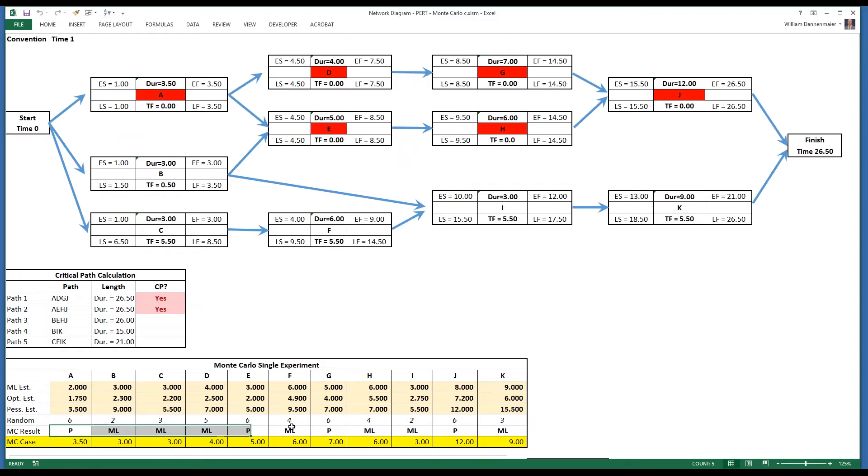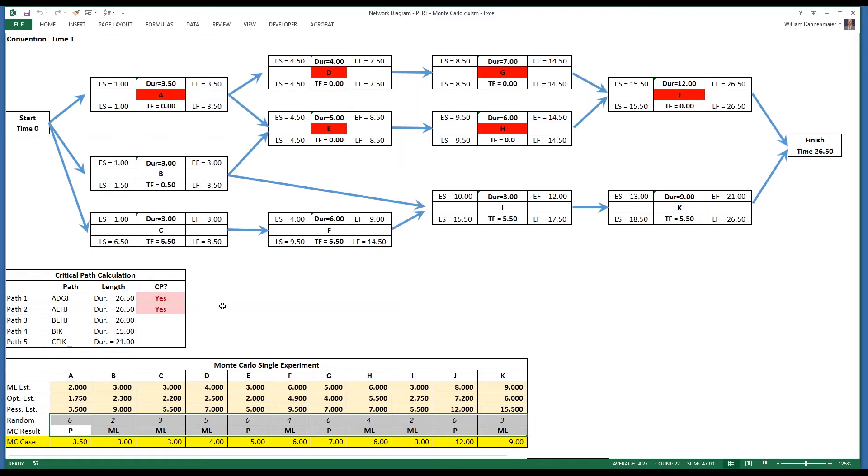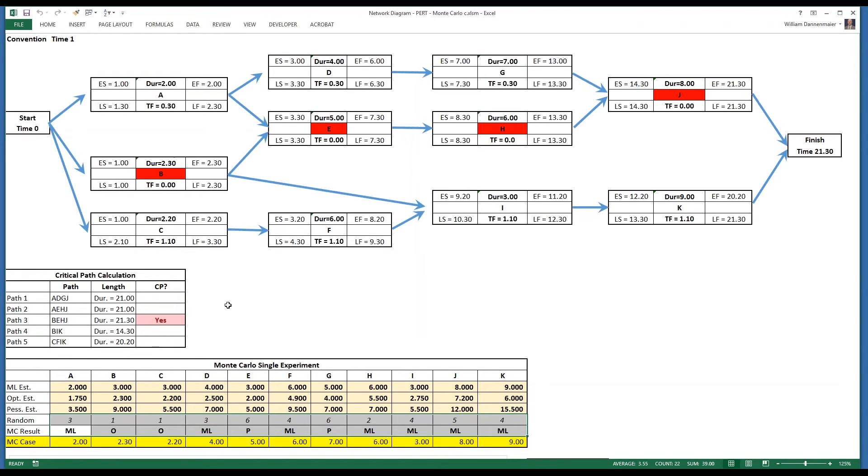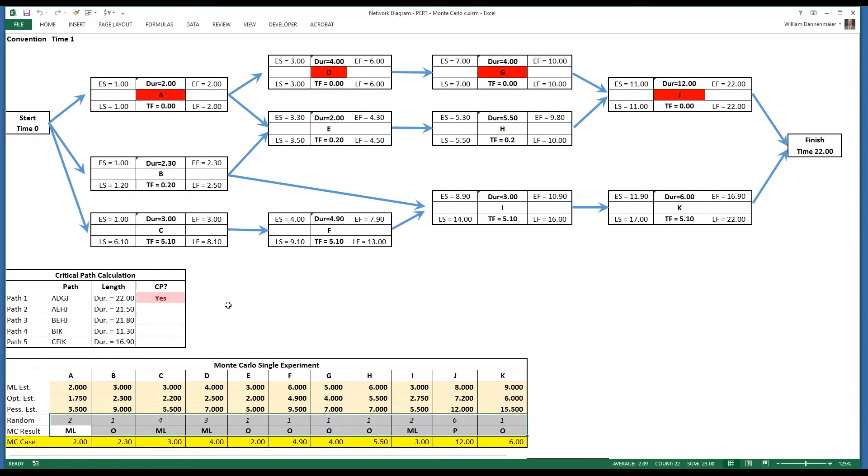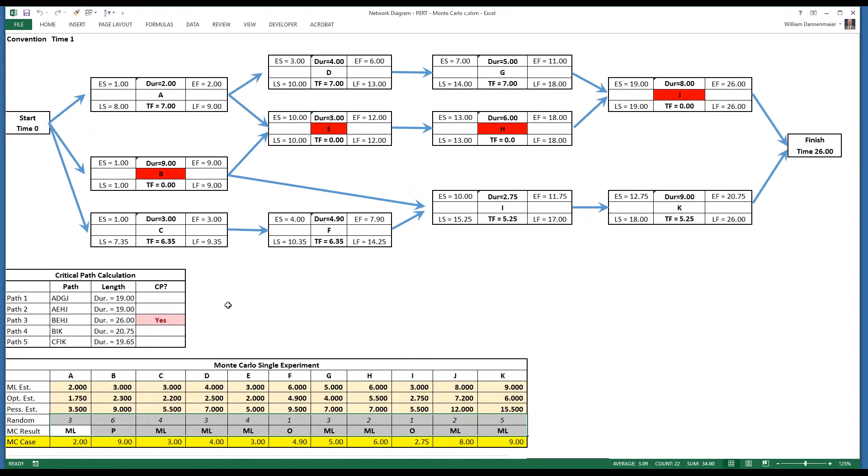It turns out that the random selection of variables below has resulted in two critical paths. ADGJ is now worth 26.5 in duration, and AEHJ is also worth 26.5 in duration. So we have two critical paths in this network diagram at the moment, and that is as a result of the Monte Carlo iteration. We'll iterate again, and we find the critical path is moved again, this time to BEHJ.